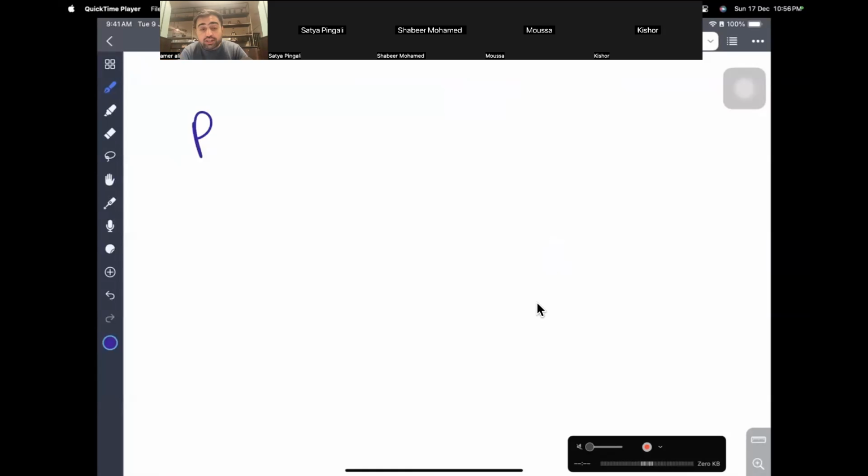Which type of contract do you really want? We decide. Then from where we want to buy, what is the source selection criteria? We look into that, and then we make the procurement statement of work. The procurement statement of work will be a statement that will have each and everything that we want from outside, maybe warranty, cost, etc. Once you make a procurement, in conduct or execution procurement, we send that procurement statement of work to the potential sellers.